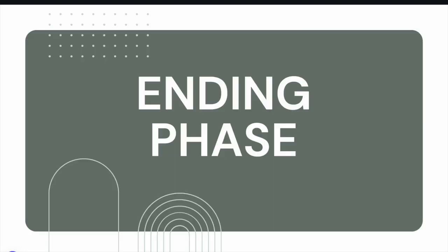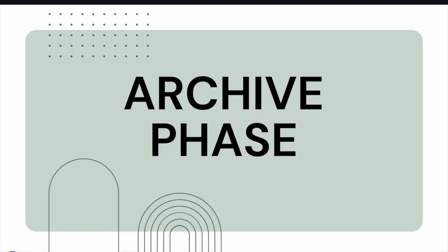Ending Phase. When all major aims are complete, move to the ending phase. This is when you would be writing or finishing up a manuscript, working on figures, and submitting the paper to a journal. After the paper is accepted and published, you move to the archiving phase. Archive Phase. This phase involves ensuring all information and documentation are stored properly, the publishing database is updated, and then you can celebrate with an archive party as the project is moved to the archived phase.